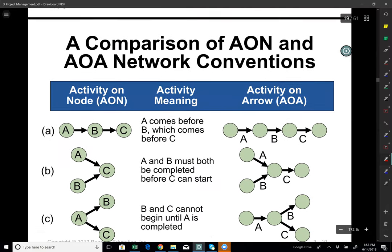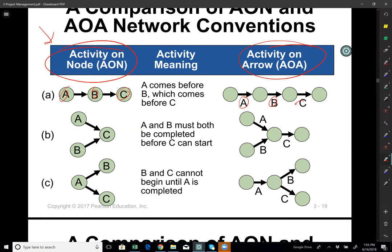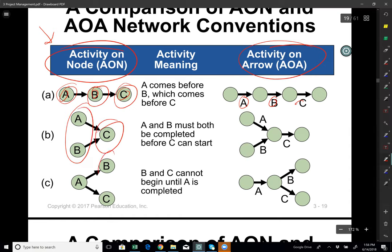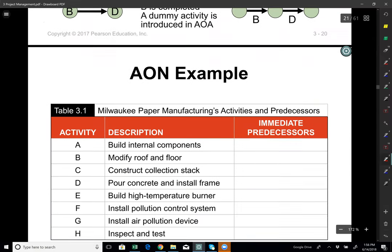There are different ways to show this network. I can show it as activity on nodes (AON), where activity names are placed in nodes, or I can put activity names on arcs (AOA). It is easier to use AON — activity on nodes. For example, I can only start C if I finish B; to start B I need to finish A; to start C I need to finish both A and B; and to start D I also need to finish A and B.